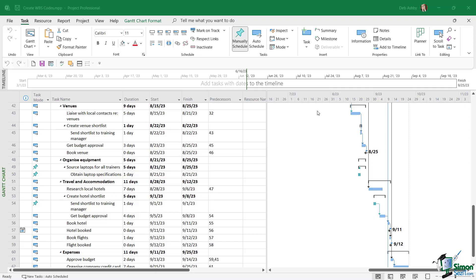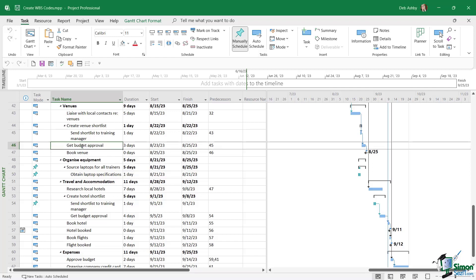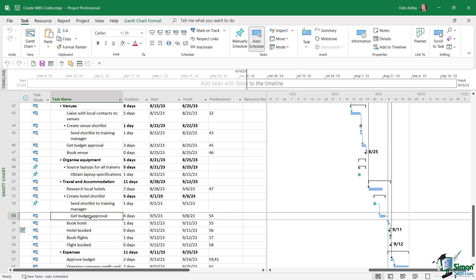Now why on earth would you need a WBS code to identify your tasks? Well, it might be that in some projects you have tasks with the same name. For example, if we look at this project on the screen, you can see task number 46 is get budget approval, and this is related to approving the budget for the venues. And then a bit further down we also have another task, task number 55, which is also get budget approval, but this time it's related to travel and accommodation for the trainers. So effectively these tasks have the same name.